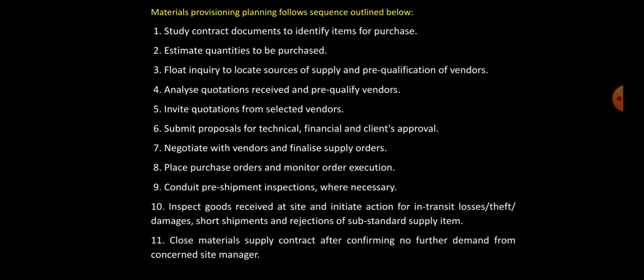The next step is placing purchase orders and monitoring order execution. Pre-shipment inspections are conducted as and when necessary. In the next step, we have to inspect the goods received, along with initiating action for in-transit losses, thefts, damages, and short shipments.